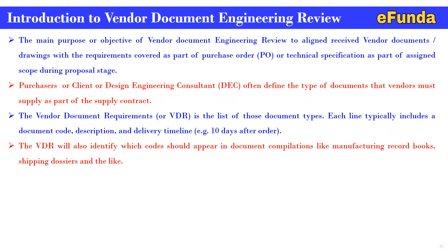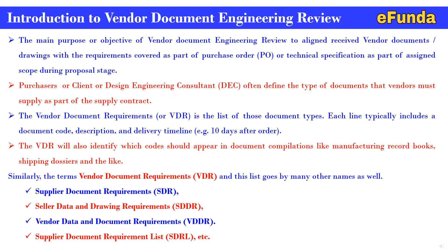The VDR also identifies which codes should appear in the document compilation, such as the manufacturing record book and shipping dossier. The term vendor document requirement (VDR) goes by many other names, including supplier document requirement (SDR), seller data and drawing requirement, vendor data and document requirement (VDDR), and supplier document requirement list (SDRL).